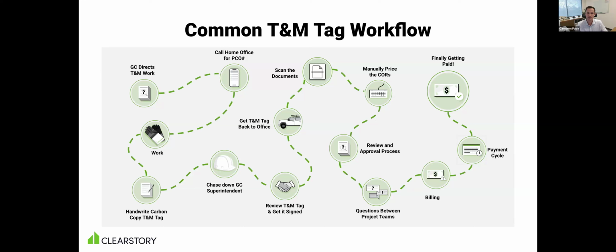T&M tickets in the industry, for a very important reason, don't have pricing on them, right? We don't want the teams in the field agreeing on changes in price. We're having them validate the quantity and scope of work performed.